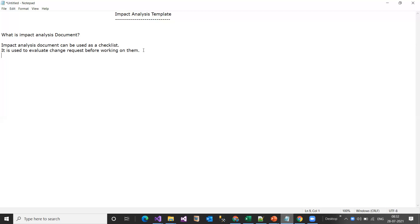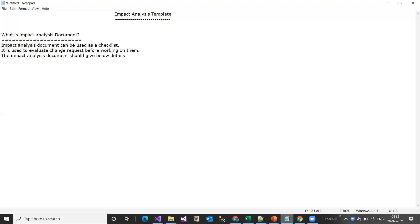The impact analysis document should give the following details: a description of the issue or description of the change request — you can call it a CR — and an explanation showing how the defect is causing failure or inefficiency going forward.